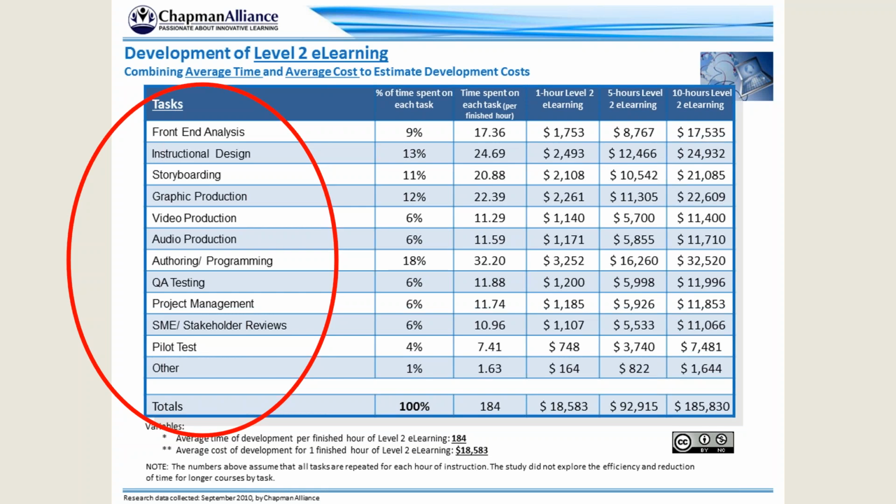So that being said, anytime you have a contract, there's how you lay out the scope, but as well, there's also the contingencies. This scope is based on your participation, blah, blah, blah. Anything outside of that will be billed at such and such hour. So again, there's ways to write it. You have to deal with your own client and whether or not they agree or don't agree with that.